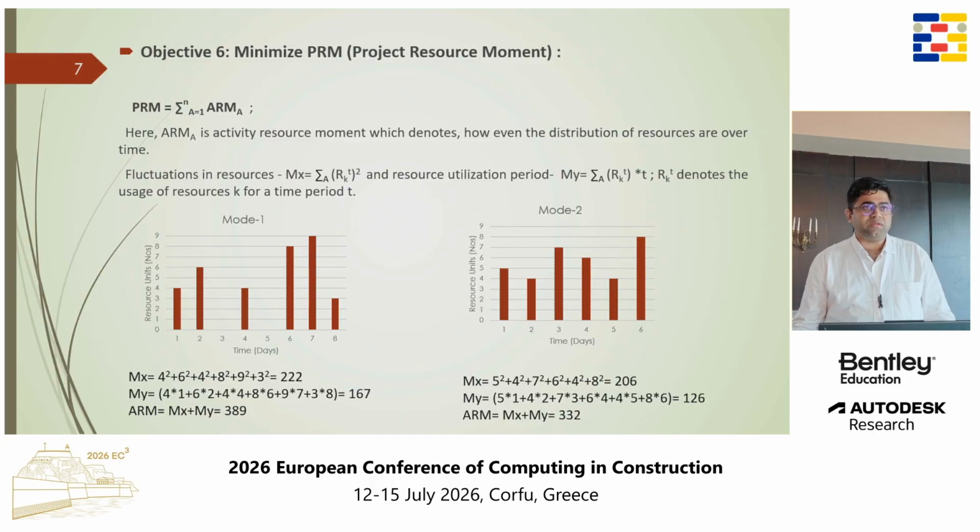Yes, we want that because it is a crucial factor for the success of a project to have balanced resource optimization. So we have defined our PRM basically as a summation of the two moments of the resource allocation: the amount of the resource being used and the duration of the resource being used. So MX and MY, the two resource moments, take this into consideration.